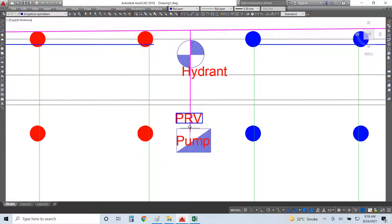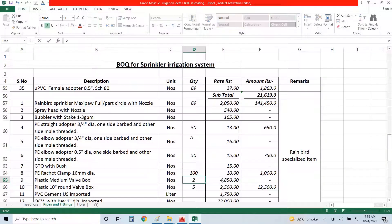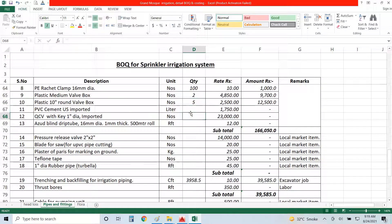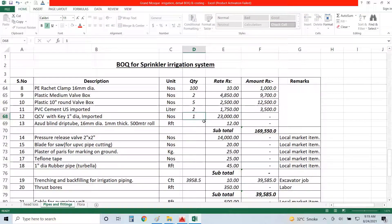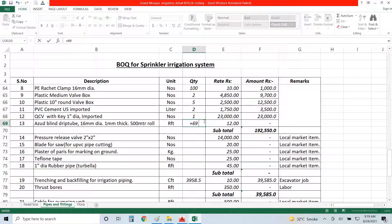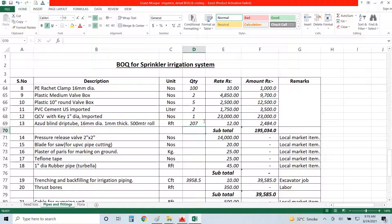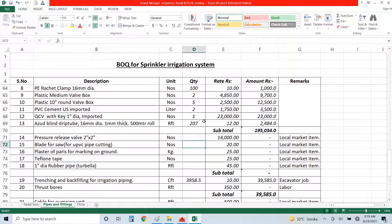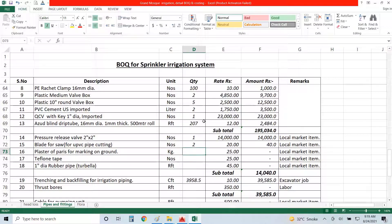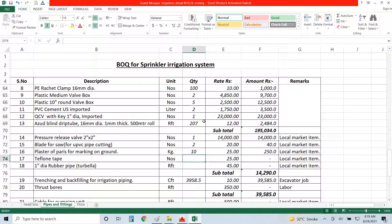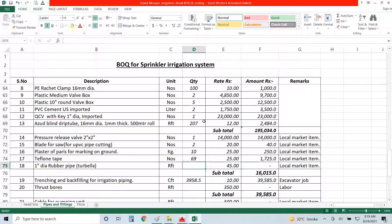Then I have PVC cement, so I will need 0.5 liter for each hydrozone, make it two liters. KCV, yes I need one for my hydrant. And drip tubing, 69 by 3, so 3 feet required with each sprinkler. And pressure release valve, yes I need one. And blade for saw or pipe cutting, I will take two. And plaster of Paris, yes I need about 10 kg for marking. Teflon tape, yes I need 69, each for each sprinkler one. Rubber pipe, I don't need it.